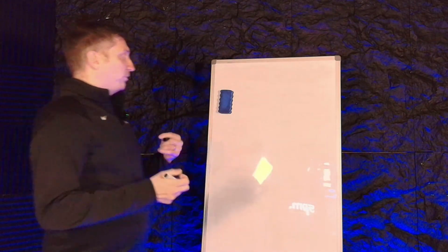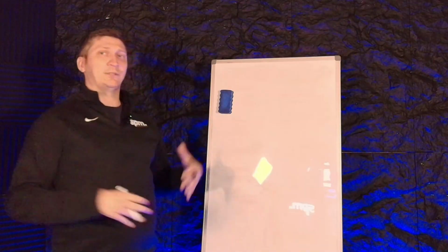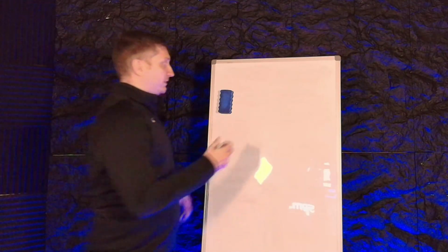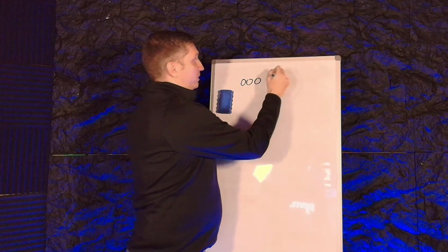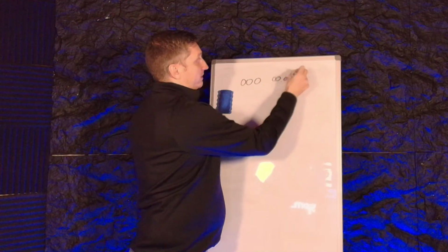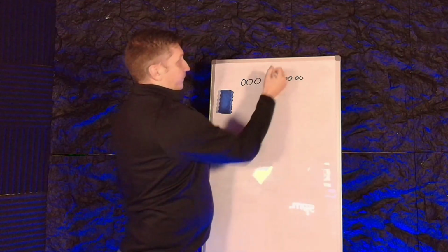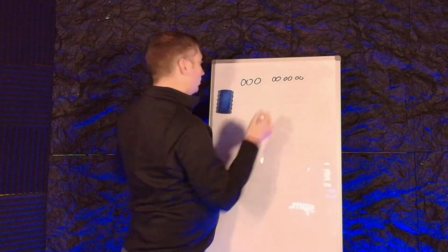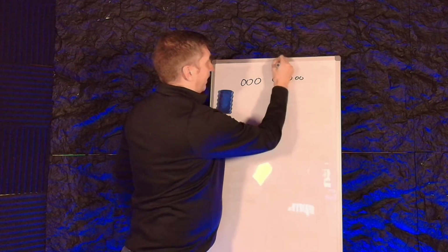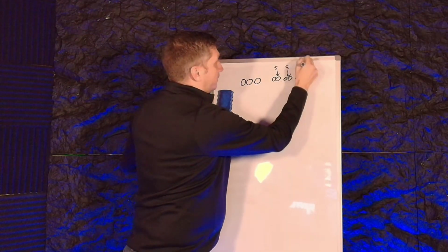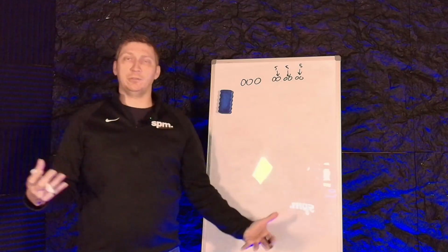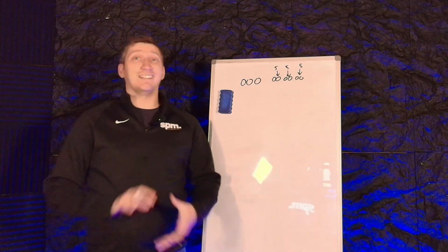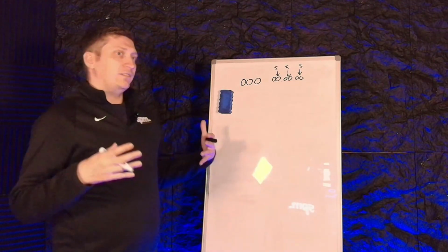That's totally fine. So we're going to start off with this: every job cost system has a series of numbers you have to use for the job cost code. Some of them are going to be 3 digits just in a row. Some of them are going to have 2 digits and then 2 digits in different sections. The one that we use uses the second model, and it allows for this to be 5, 5, and 5. So if you think about how many different cost code sections I could have if I had 10,000 codes 3 different times, that's a lot of different combinations. So we don't want to do that many.